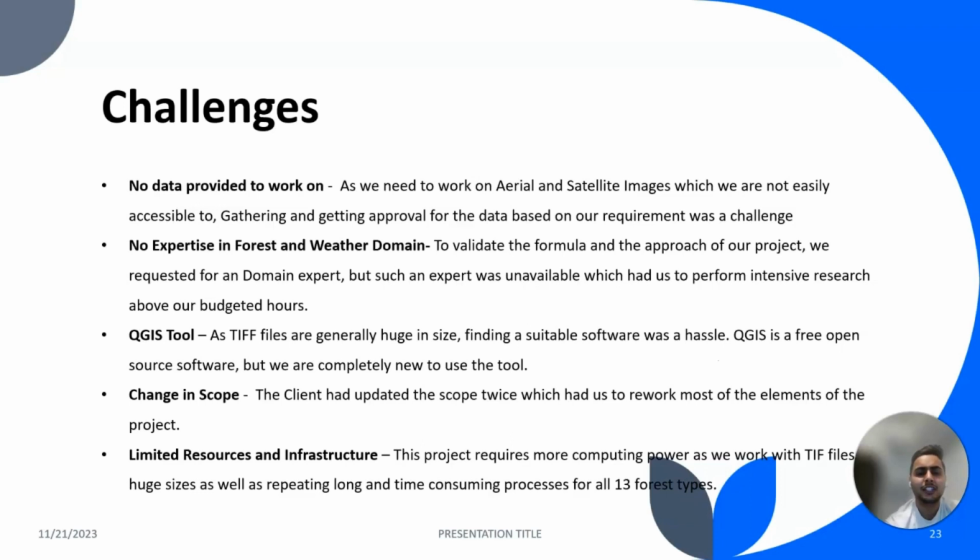Next is the change in scope initiated by the client. The client had updated the scope twice, which had us rework most of the elements of the project we had worked on until then. Next are the limited resources and infrastructure available for this project. This project requires more computing power than what is available to us, as we work on TIFF files of huge sizes, and repeating a long and time-consuming process over 13 forest types is a challenge.